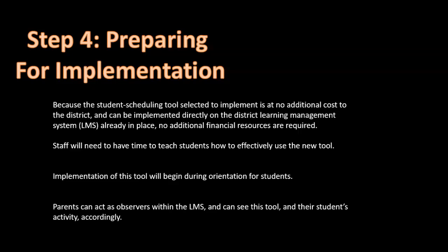As we prepared for implementation, we recognize that staff is going to need some time, not only to learn it themselves, but also to have some time built into the schedule to then teach the students how to use this new tool. So what we decided is that implementation for this tool would begin during orientation week. Staff members are going to do some training during pre-planning on how to use this tool. That way, during orientation, all students will learn how to use it before we turn it on.